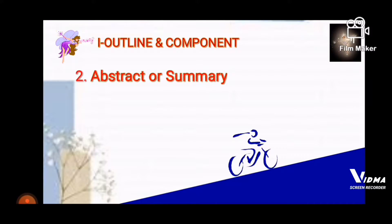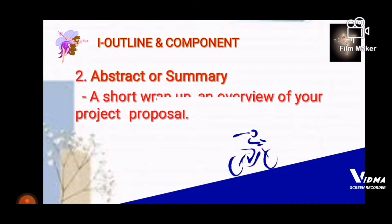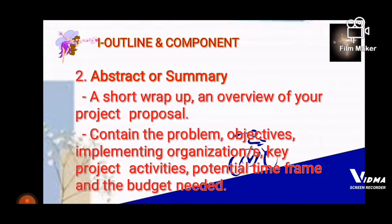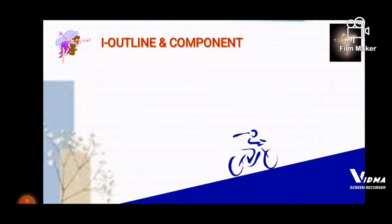Second, the Abstract or Summary — a short wrap-up and overview of your project proposal. It contains the problem, objectives, implementing organizations, key project activities, potential timeframe, and the budget needed.